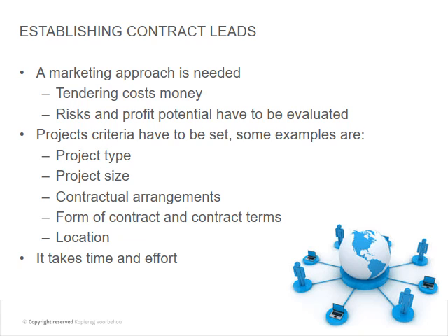And also, for instance, something that I can think of is working in rural communities, it does have a bit of a risk of the community involvement and so on. Some people like it, but you have to build in a bit, your rates will be different because you're going to spend a lot of time in meetings with the community and so forth. Or if you have a very high rise building, your insurance will be higher. Do I want to take that risk or not?